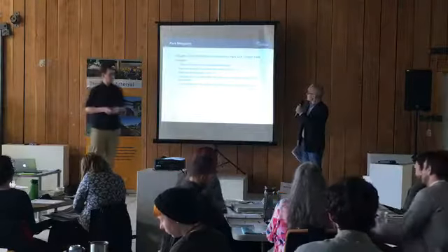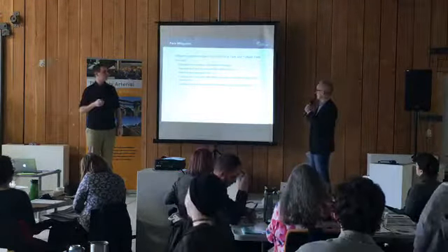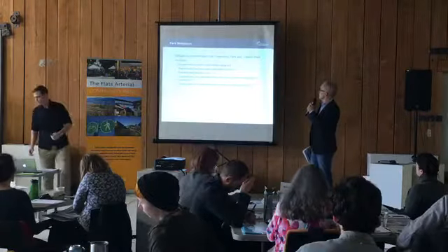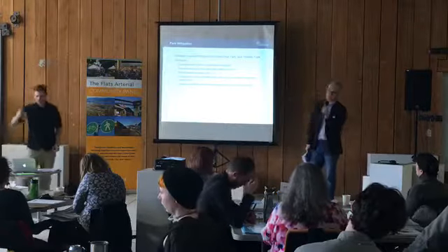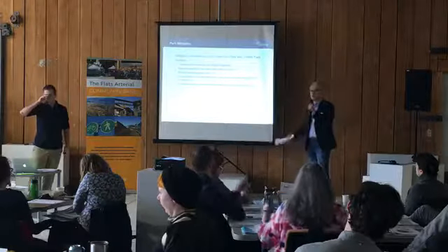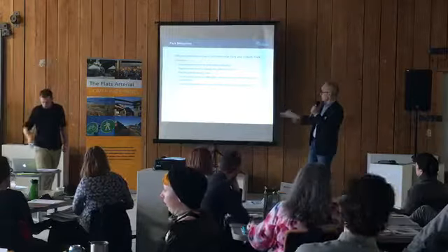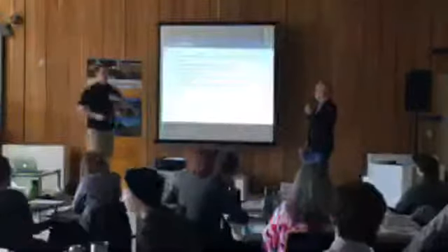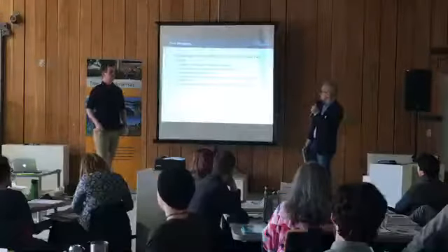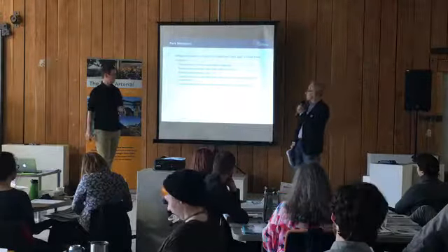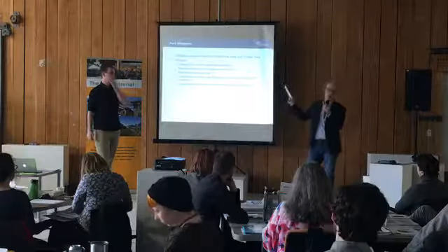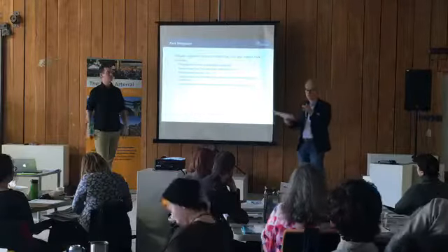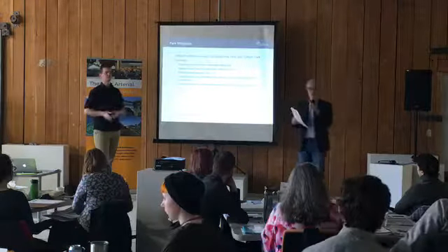The aspects of park mitigation from the impacts of the options include replacement costs for amenities impacted, so anything such as a track or a field house, or environmental assets as well, or ecological assets, would have to be replaced. Any trees that are lost would have to be replaced, and replacement and compensation means there's only so big a tree that you can plant, and that has a cost, but there's also a compensation value for large mature trees.